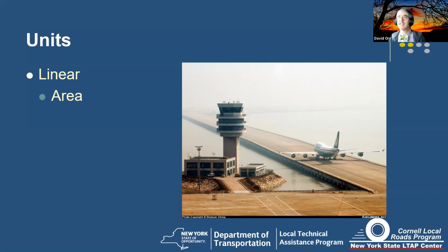Okay, I'll ask the question a different way. What's the narrowest road you have in your system? Yeah, there you go. Widths vary. If every road you had was exactly the same width, yeah, you could just do it by center line. But if your widths vary even a little bit, then you need to account for that variation. I mean, heck, just a 2-foot difference in the width of a standard 22-foot pavement is 10%.